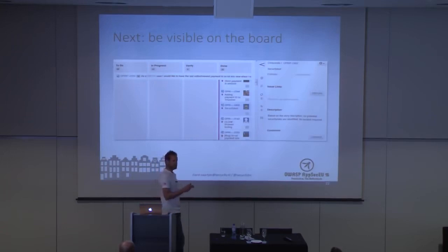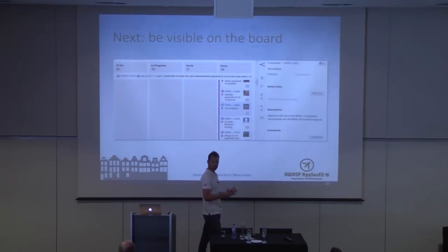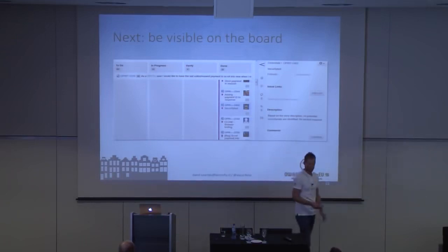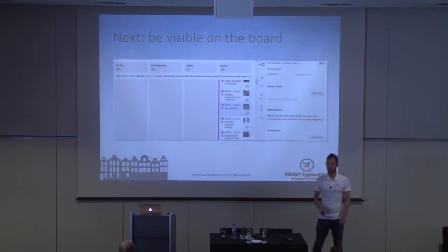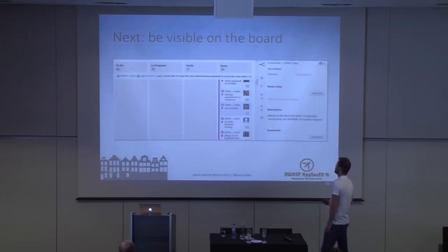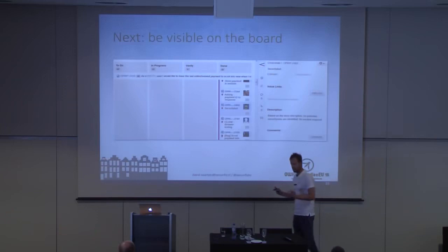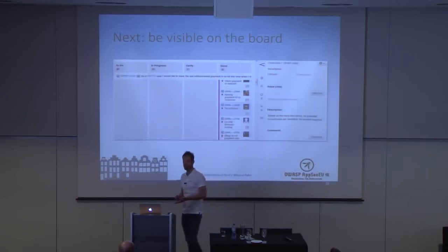So we were really trying to get as much assurance as possible from code reviews, because this is really efficient. If you need to set up all your tooling, wait for environments which are not stable, and agree on time slices, then time is speeding up really fast. So we only did this if we really needed it. And if we added such a hands-on test case, we also put in there what our requirements were, what we needed, which test data, and when we needed it. And this worked pretty great.